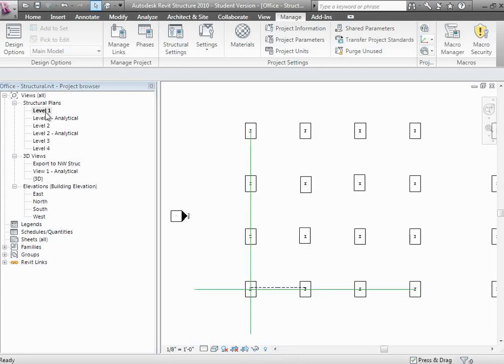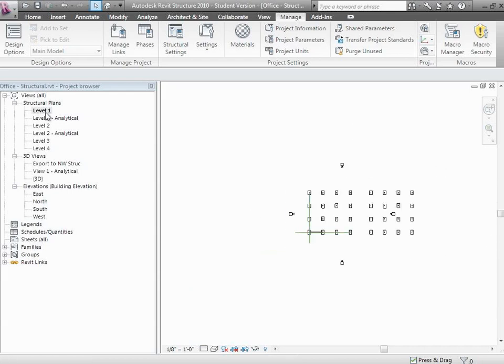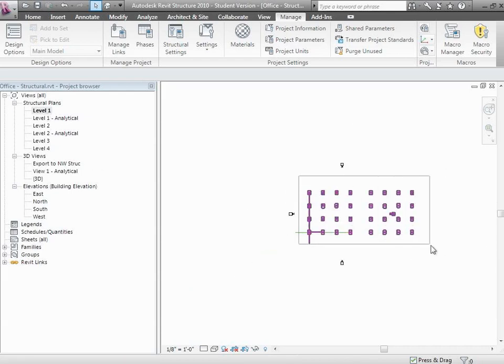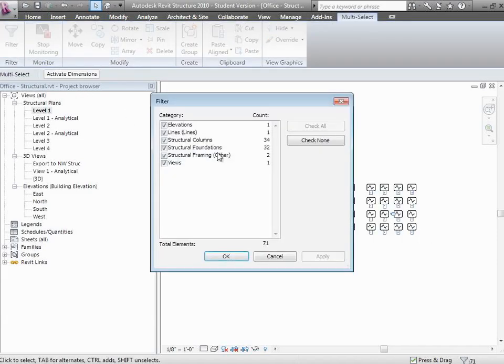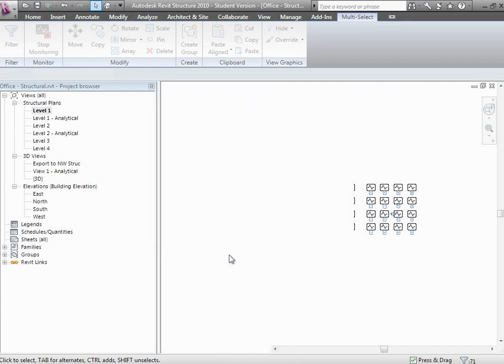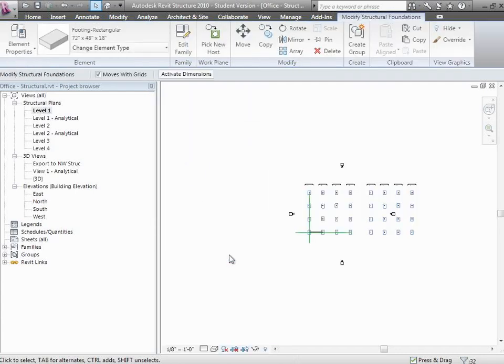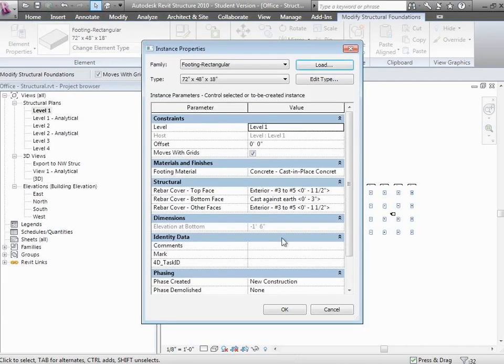If you think about a view where you can see all the different elements, like the first floor view, I could select all those elements and then do a filter. So if I wanted to get all the foundations, that just has all the foundation elements. I want to associate those all with ID 110, so I can associate them with 110 right here.